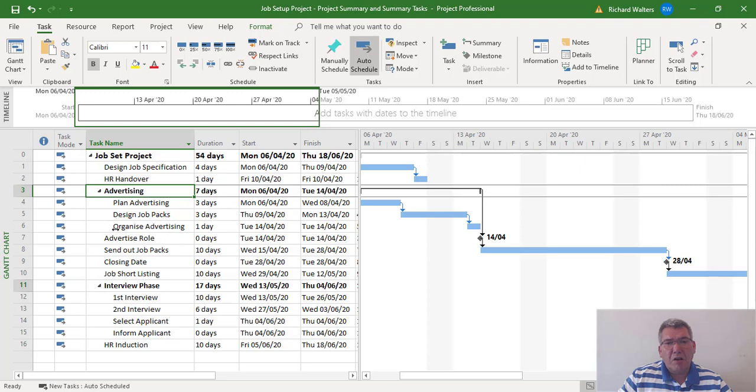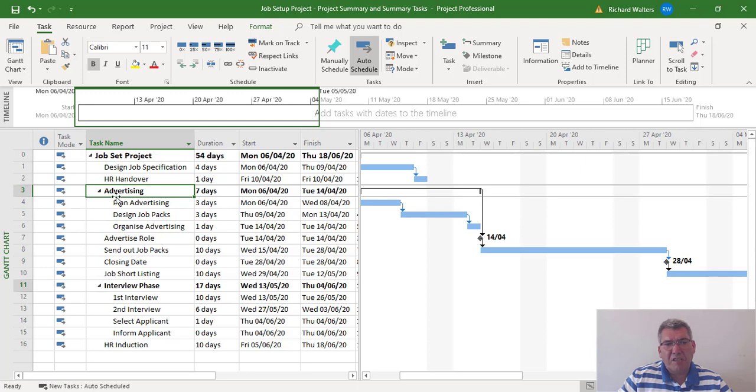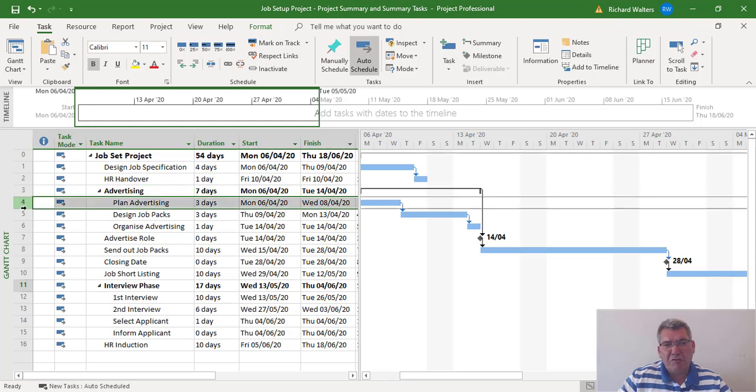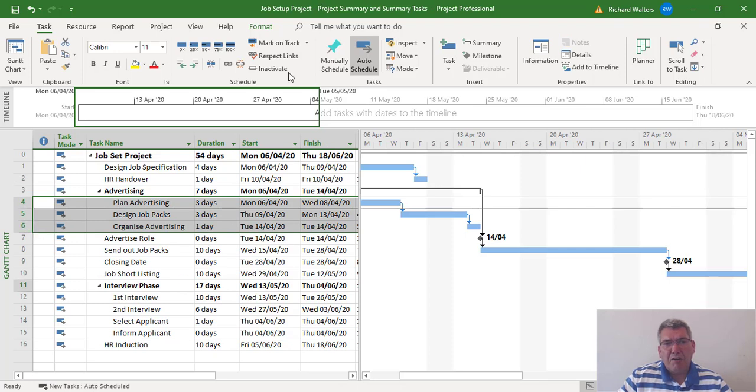Now I'm going to look at putting in a new task. In a summary task you can add a new task with it still being a summary task. Personally, because I'm very careful and safe when I do this, I actually get rid of the summary task and reset the summary task, so I'm going to get rid of the summary task in this example.